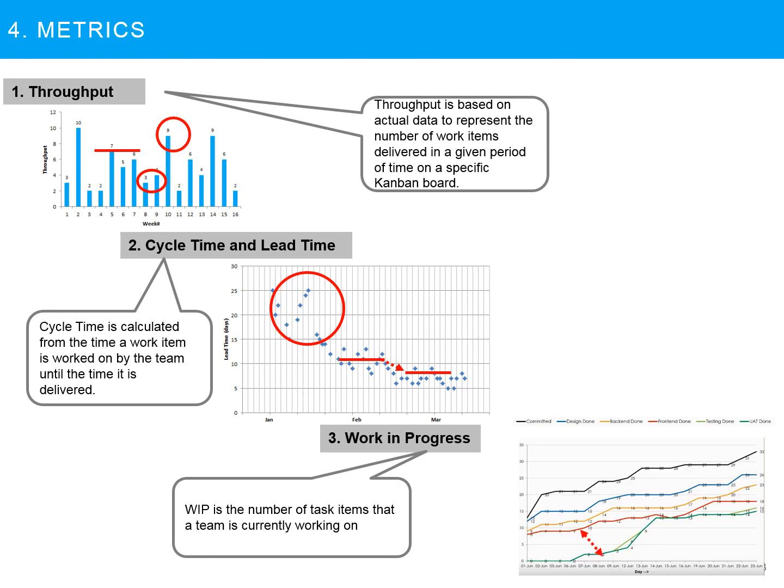So one problem is this zone. You can say there is too much work in progress. The gap between two lines shows how much work is in progress. Too wide a gap between two lines means too much work in progress. On the other side, you can see over here, there are two lines that are sort of touching each other, which is a possibility of starvation. That means the tester does not have work on this particular day. That's the beauty of CFD. You can track and see what kind of dysfunction in the flow is creeping in.